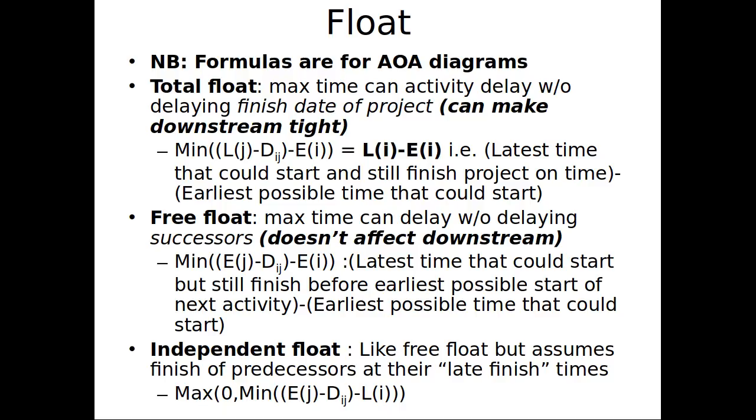It's seen as a somewhat transgressive thing. It's as if you stole my float, because you've shifted me into the position where I'm to be blamed if I delay at all. Whereas previously I had float, which gave me slack, which meant if I was a bit late, it wouldn't hurt things. So there's free float, and then there's a further notion called independent float. Just please note that total float is not the only one.